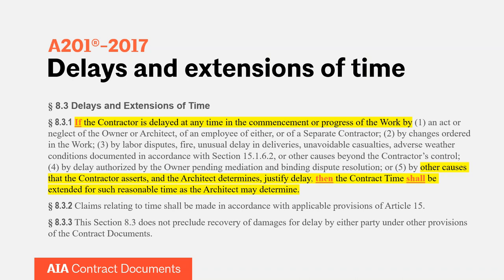Reading subsection 5 in full: 'If the contractor is delayed at any time in the commencement or progress of the work by other causes the contractor asserts and the architect determines justified delay, then the contract time shall be extended for such reasonable time as the architect may determine.' The difference between subsection 3 and subsection 5 is the level of architect involvement — a little less in subsection 3, a little more in subsection 5. Sections 8.3.2 and 8.3.3 are also relevant: 8.3.2 states that claims relating to time shall be made in accordance with applicable provisions of Article 15.